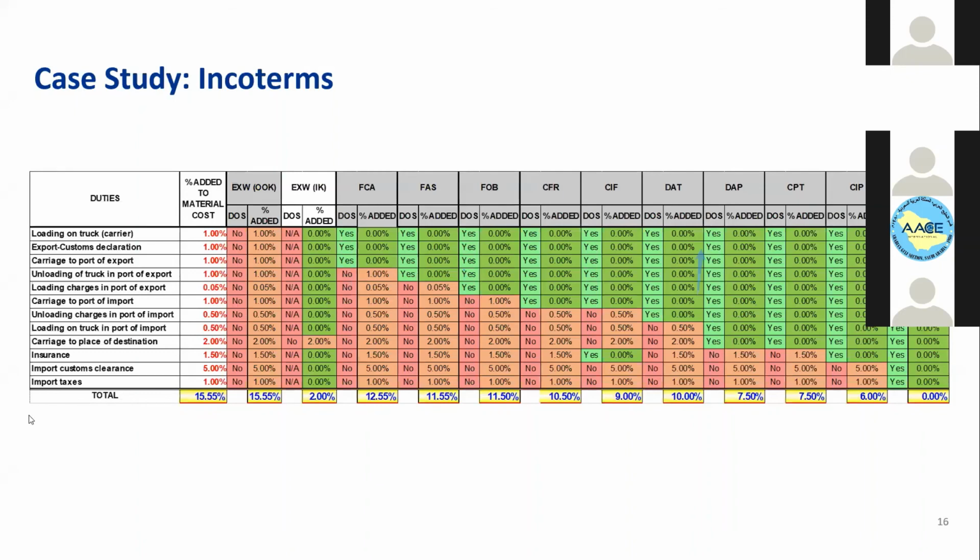On what basis, for another project, can we assess how much percentage? You can assess it with the vendor. For example, if the vendor provides you the budgetary quotation and mentions that it is under Incoterms, let's say Ex Works in Kingdom, you share the percentage with him. Once you submit your estimate to the client, they will not take it as it is. They will do a validation, sometimes with something confidential for you but not confidential for them, like the contract. They compare the budgetary quote that you used as a basis of your estimate with a real purchase order with the same material.